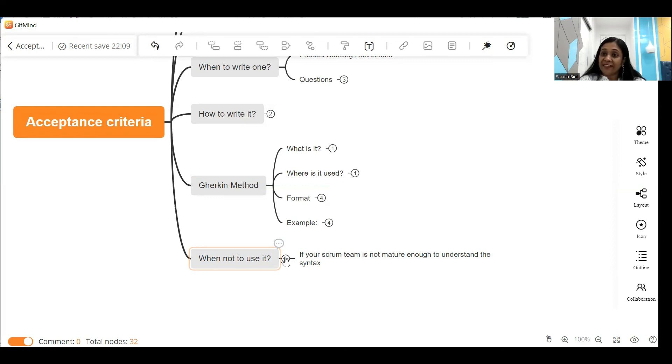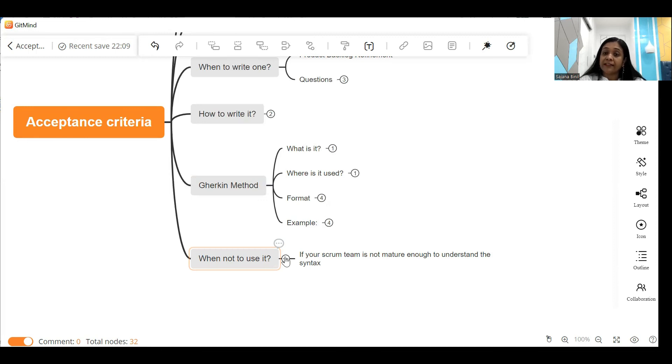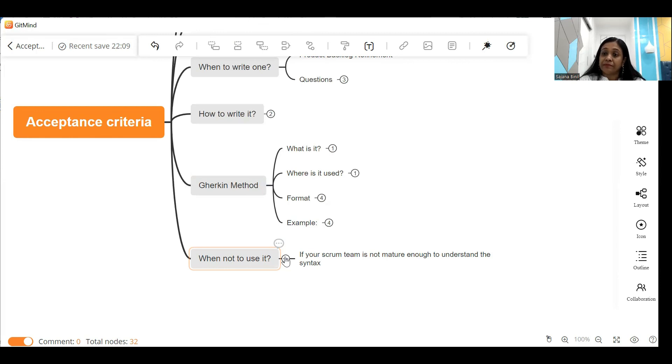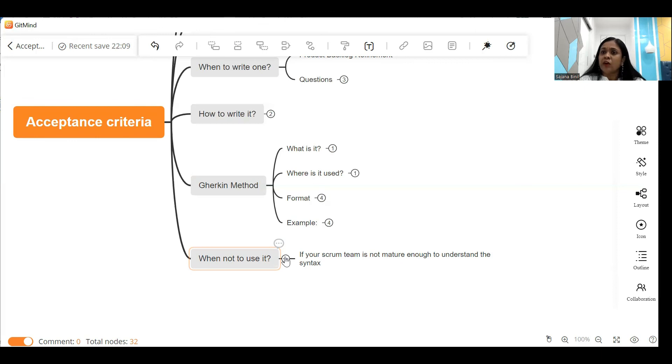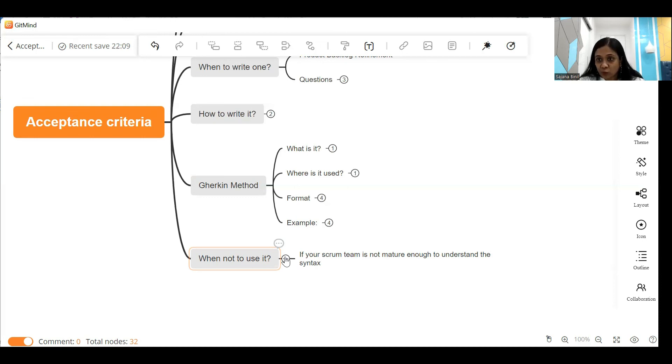If you write acceptance criteria using Gherkin in a team that is relatively new, you will find that most of your time is consumed in explaining these acceptance criteria again and again to the developer and the testing teams, because they are not familiar with the syntax. So that's why I recommend for beginners, always go with the simple bulleted format of writing acceptance criteria, and use Gherkin only if it is mandated by your projects. Certain projects mandate it because they use Cucumber as a testing tool. Then in that case, go ahead and write your acceptance criteria using Gherkin.